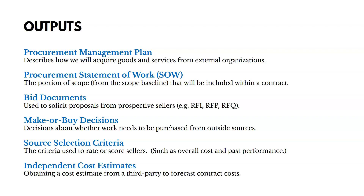Make-or-Buy Decisions document what we're going to make or do on our own versus buy from outside sources. Then there's Source Selection Criteria — a scorecard for how we're going to grade or score potential sellers. Hopefully we have several options and use Source Selection Criteria as a means of scoring them. We could also have Independent Cost Estimates as an output — obtaining a cost estimate from a third party to forecast contract costs. It's like getting a second opinion from a doctor to confirm a diagnosis; it's just good practice.